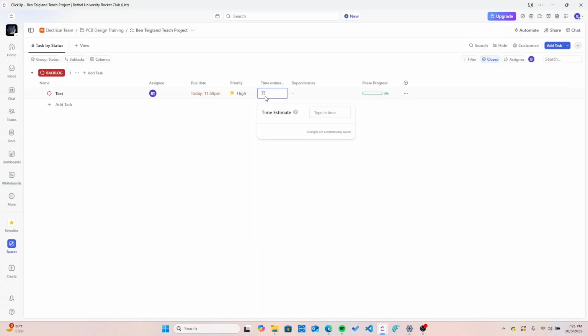It's really good engineering practice to be able to try to estimate your time and then see if you hit it. It's kind of important because in my current job, I have to estimate how long a project's going to take. That's how much we bill the client for. And if I estimate too low, the client's going to be unhappy when I come back and ask for more money for the project. And if I estimate too high, I might lose the job because they'll go with someone cheap. So getting good at practicing time estimating is a huge thing that I really encourage you to do on this.